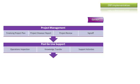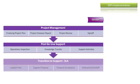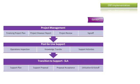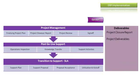The knowledge is then transferred from the consultant to the customer, with support and shadowing activities on a daily basis until closing the first month. Some projects move to an SLA — Service Level Agreement — for a support plan with the partner, who submits a support proposal. If accepted, the SLA support project is utilized and kicked off. The main deliverables of the Operations phase are the project closure report and project deliverables.